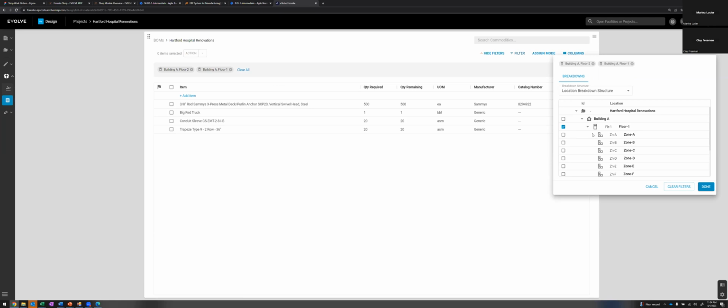And pretty soon you'll be able to map these directly to the work requests, and it will start doing quantity accounting for you. It will track how many quantities you have assigned. So when you're doing your 3-week look ahead planning, you can go to the locations that you're going to be working on, go to the work phase that you're going to be working in, and you can track that you've assigned 100% of the quantities associated with that. So that's a little bit of foreshadowing. We'll be going in deep on that topic in about a month.